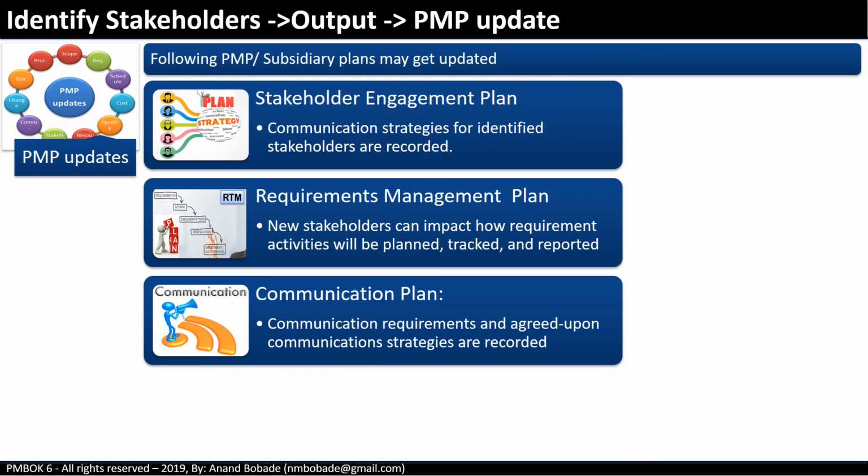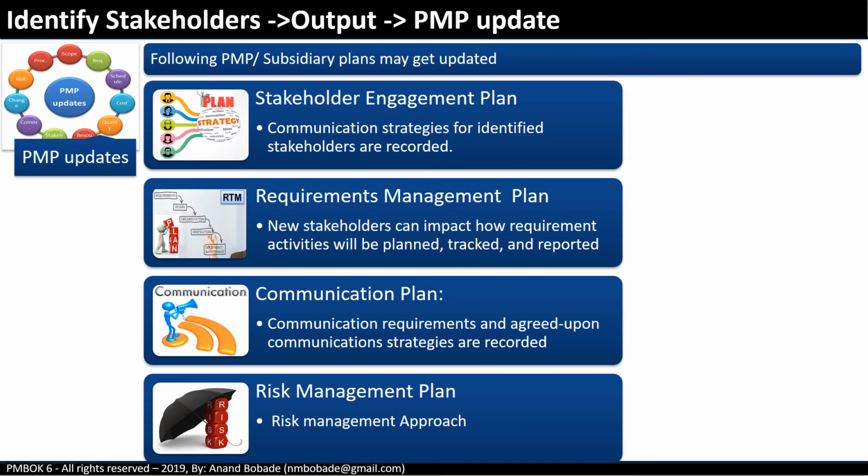Stakeholder communication requirements and agreed upon communication strategies are recorded in the communication management plan. If a stakeholder's communication requirements and communication strategies affect the risk management approach on the project, then this is reflected in the risk management plan.